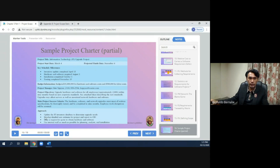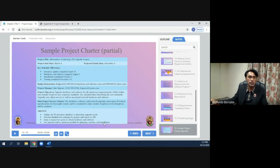The project approach will be to update the IT inventory database to determine upgrade needs, develop a detailed cost estimate for the project and report, issue a request for quote to obtain hardware and software, and use internal staff as much as possible for planning, analysis, and installation.